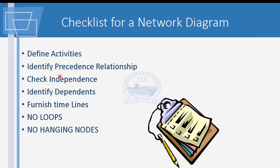In CPM and PERT, the network diagram is fundamental. When you join an organization, you need to know the activities associated with the work. This evolves through common sense and experience gained in the company. Remember: there should be no loops and no hanging nodes in your network diagram — these are key constraints to ensure when preparing it.